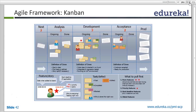This is called work in progress. The pull concept in Kanban means pulling tasks from not started to in progress, and then from in progress to done. Nothing is being pushed back — tasks only move forward. It's a pull technique.